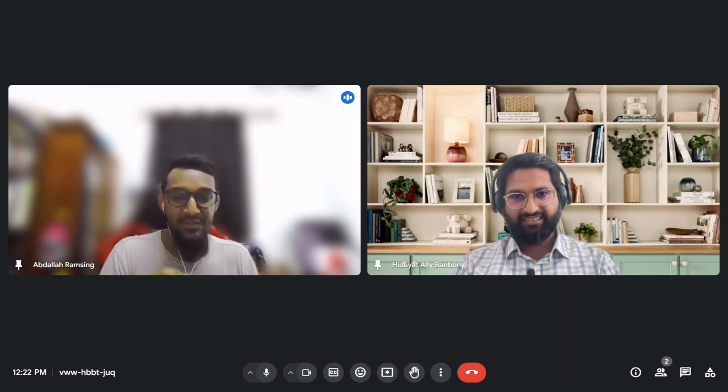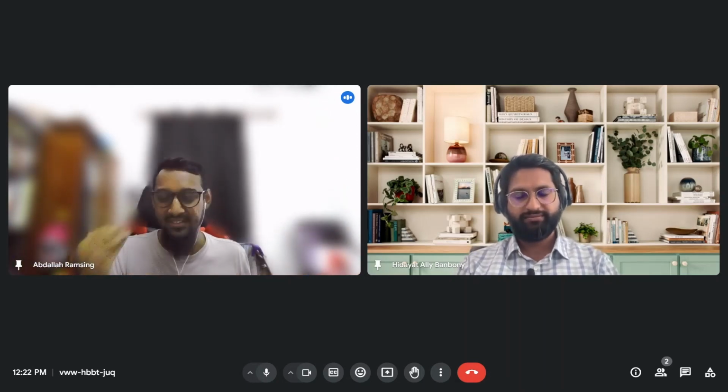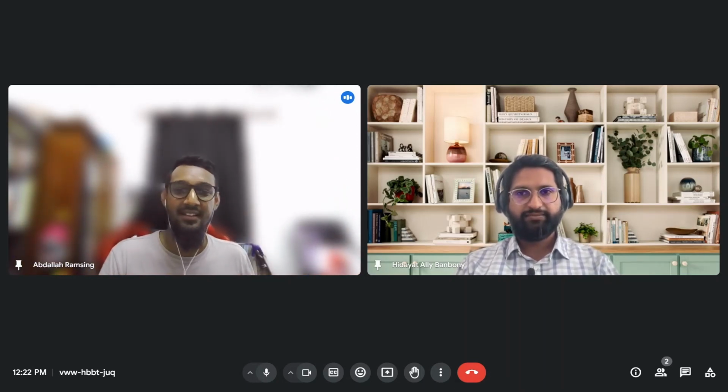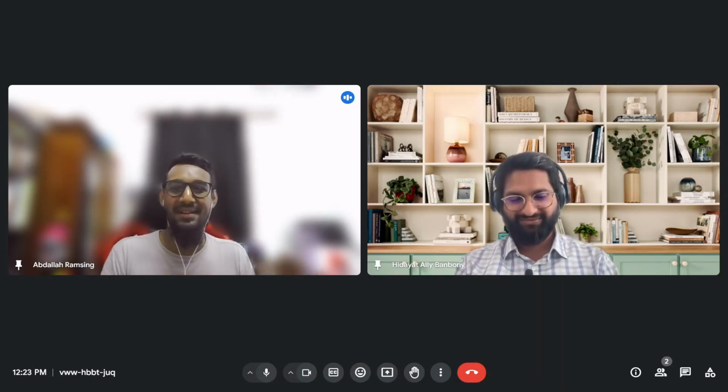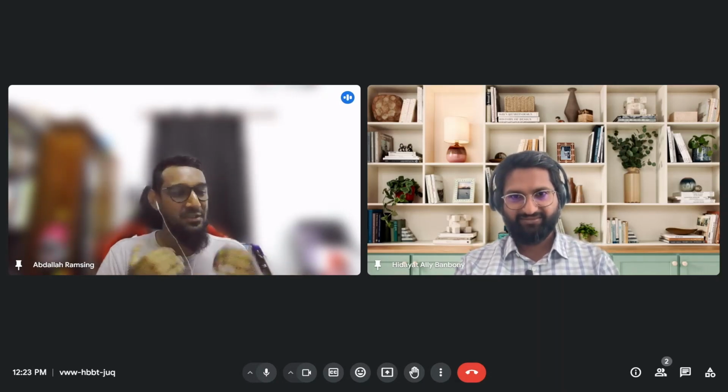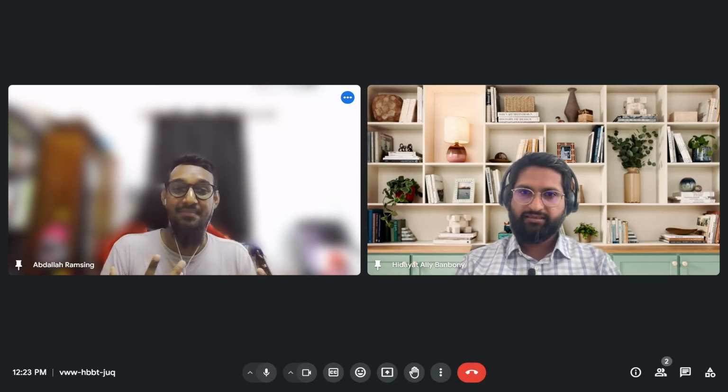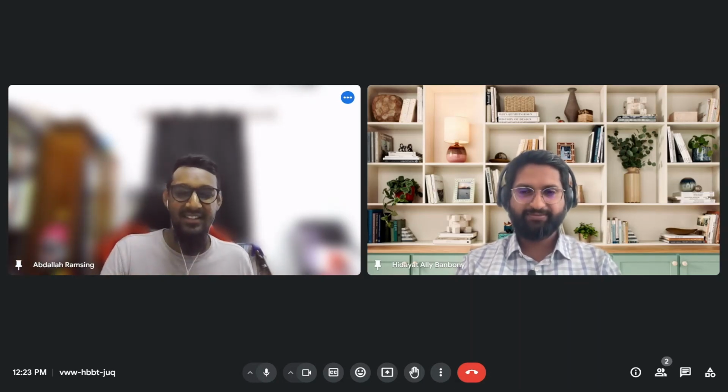I'll give you a specific example. There was a key person, let's say a PO or someone like that, who was absent for half of the sprint. And of course, a lot of important decisions were delayed. So everybody knows this is the elephant in the room: this happened because the PO wasn't here. But nobody is going to say anything about this, directly or even indirectly, just to keep the vibe good. And I think that's wrong. But likewise, I can say myself, I don't have the courage to go and say, boss, you were absent, that's why we couldn't deliver. So this is a problem.